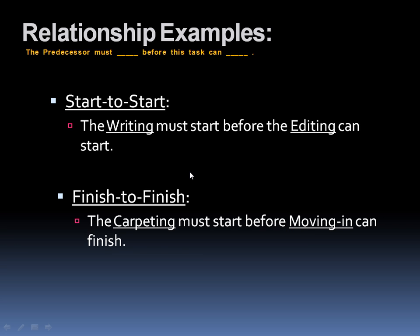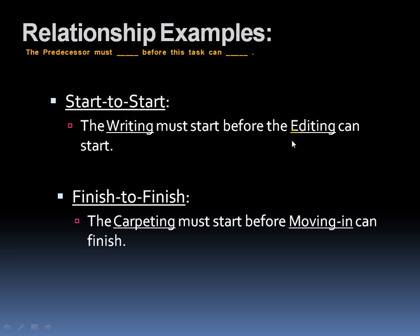Start to start. The writing must start before the editing can start. Now let's think about that. Before we can edit something, something must be written. So obviously, in this case, you'd want to start writing, even if it's just a paragraph, in which case, it doesn't sound very efficient, but at least you've got something to edit, even if it's just a word or, like I said, a paragraph.